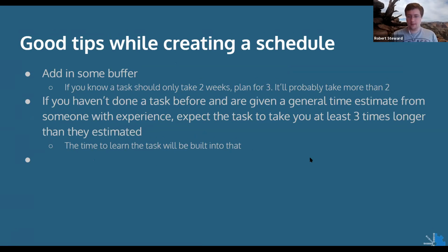Then as well, and this was what I was sort of alluding to before, if you haven't done a task before, and someone gives you an idea of about how long they take to do it, if you multiply that time by about 3, that may give you a better idea of how long it might take you. Like I said, that additional buffer is really going to help, especially when you have no experience with it.